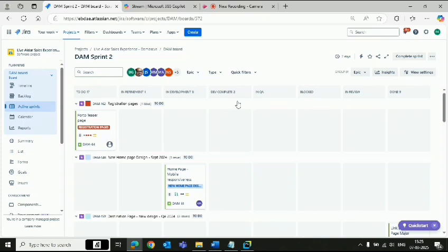If everything is working and testing is complete, the tester can move it to in review by assigning it to the project manager or Scrum Master. They will review the task, bug, or item. If everything is fine and testing is completed, it will be moved to done state by the Scrum Master or project manager.